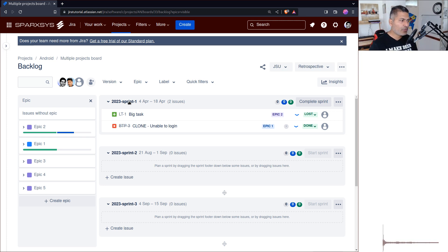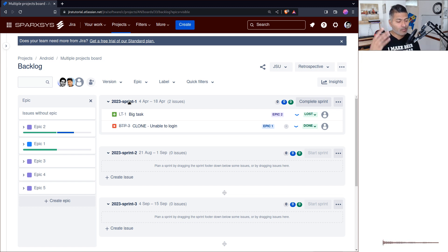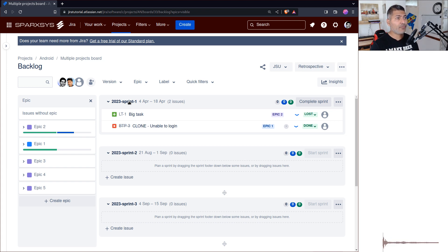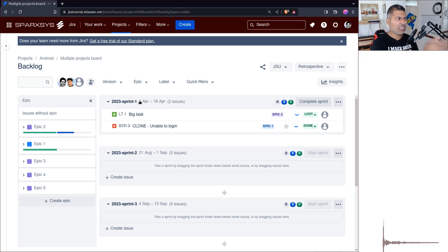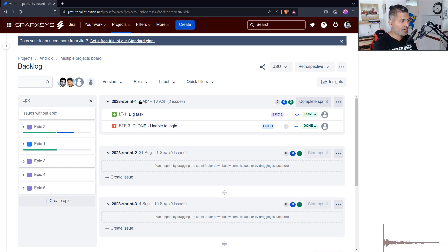When it comes to naming convention in Jira, feel free to write anything else in between. I've seen people using the name of the team in their sprint names, which can be relevant if you have scrum of scrums or multiple teams working on the same cadence toward a specific goal — for example, Android, website, platform, and API teams. The prefix should ideally be the year, the suffix should be the sprint number, and in between you can have anything, as long as it makes sense.